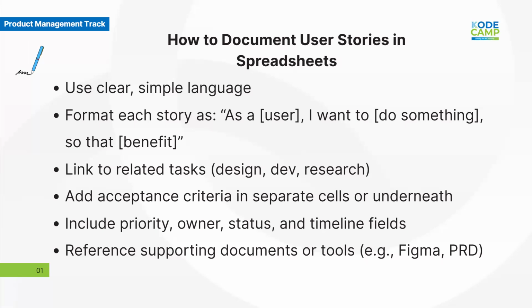Now let me expand it with the details and some specifics. Right next to that title, in another column, you write the acceptance criteria. Don't worry, I'm going to put this out for us to see shortly. What needs to be true for this task to be considered done? For the recipient example, it might look like: user can input name, bank, and account number. And then you have system validates account number format, save recipient, right? Button appears only when the form is completed and so on. Now, a confirmation message is also shown after saving. You basically do not need to overthink this.